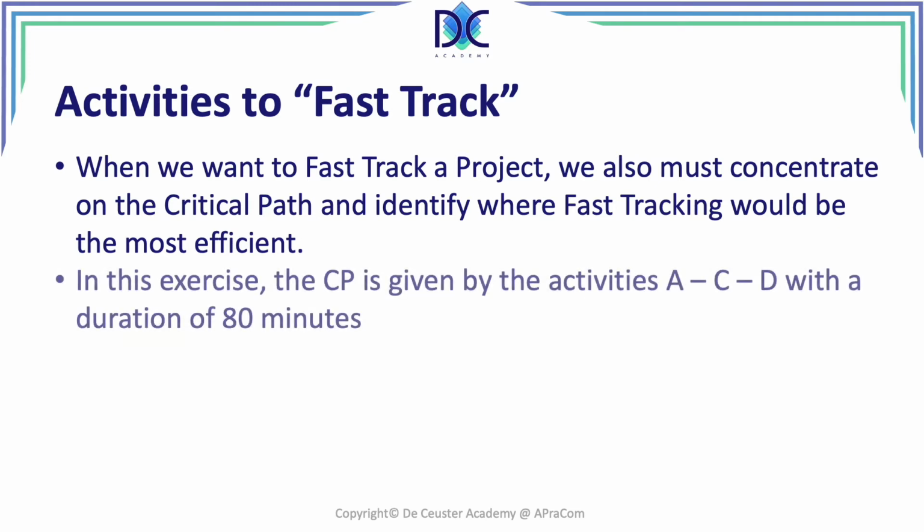In our example, the critical path is given by the activities A, C, and D, and the total project duration is 80 minutes. In our case, we want to see what we can do, how we can reduce the project duration. Let's say 80 minutes is too much, but we want to find a better solution. And let's see how we can reduce this project most efficiently, the shortest duration in our case,